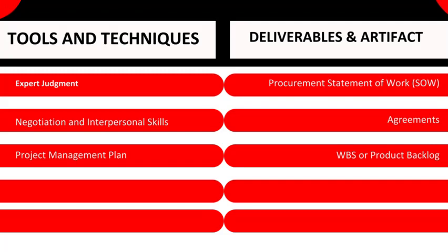The team updates the project's work breakdown structure, WBS, to include the following tasks: download and install the software development tool. Create user accounts for the software development tool. Configure the software development tool. Test the software development tool. Train the customer on how to use the software development tool. Hand over the software development tool license to the customer.